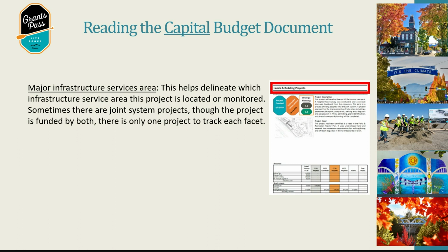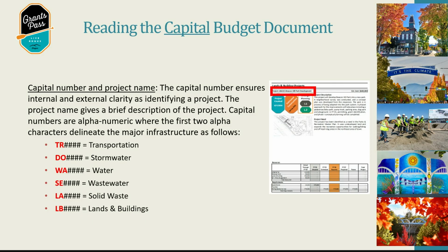So what that means is even though we may have a sewer project, water may potentially give money to sewer, because at the time that they are replacing the sewer line, they're also going to go and do some water work at the exact same location. So they fund it all into one project, and that's where you'll potentially see sometimes an outside funding source from a different fund, and that is allowable.